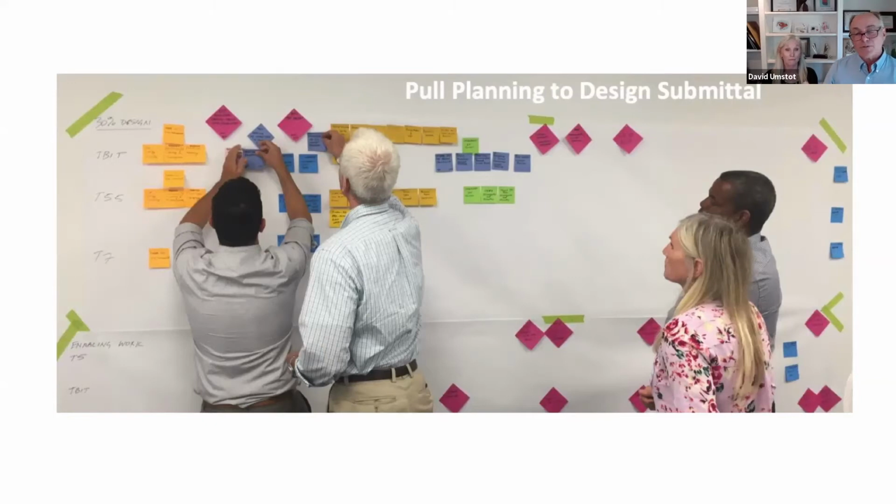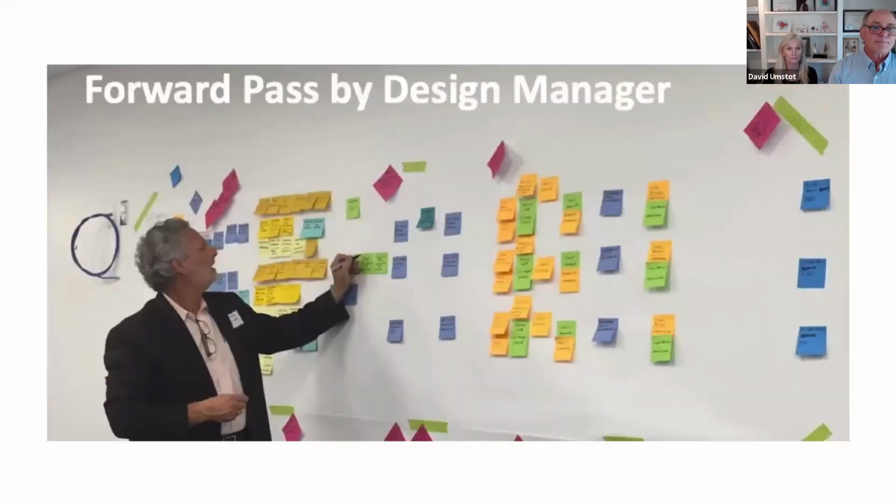So there's Tom Bradley International Terminal, a combination of what they call Terminal 5.5, which is a combination of Terminal 5 and 6, and then a separate stop at Terminal 7. It's a pretty sizable project, about $340 million in rough terms. Anyhow, this is part of the design process. You can see that they have some milestones. All the purple magenta diamonds are milestones tied to certain design deliverables, and they are doing their phase pull with the activities they need to do for their work, okay?